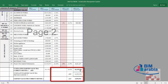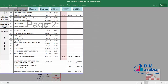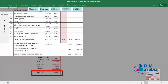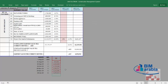Step 4 is now completed. We have the cumulative earned value for the project showing how much work has been done: 16 million out of 251 million, which is 6.43%. The previous earned value was 12 million, so the current earned value for month 6 only is approximately 4 million. We go to step 5, which requires typing the same earned value manually into the cell — 4 million — to fix the earned value for each month and prepare for the next month. The earned value steps are now complete.